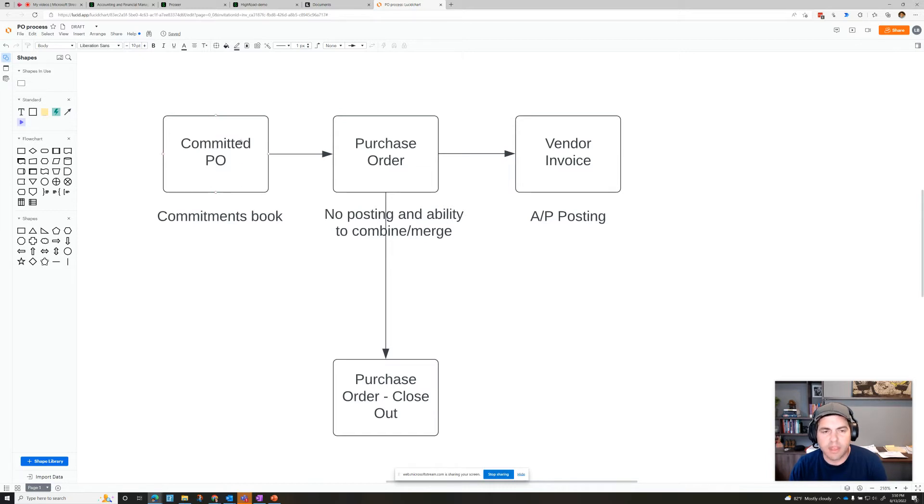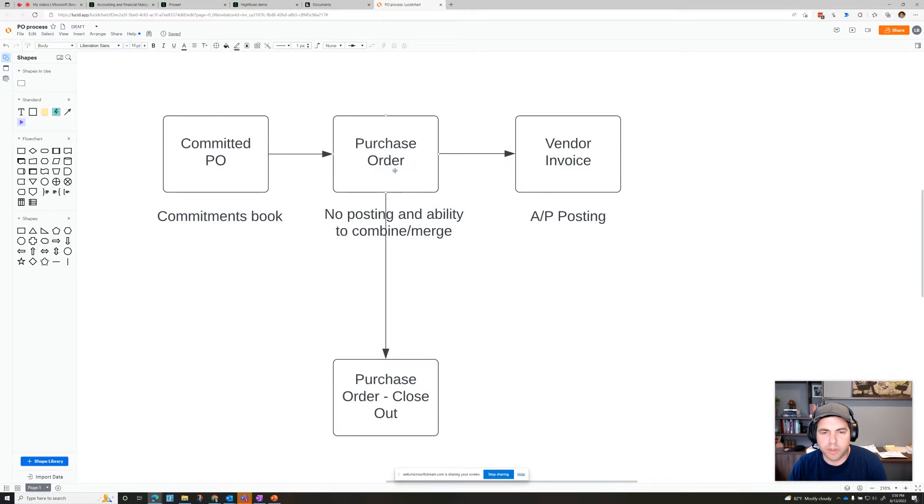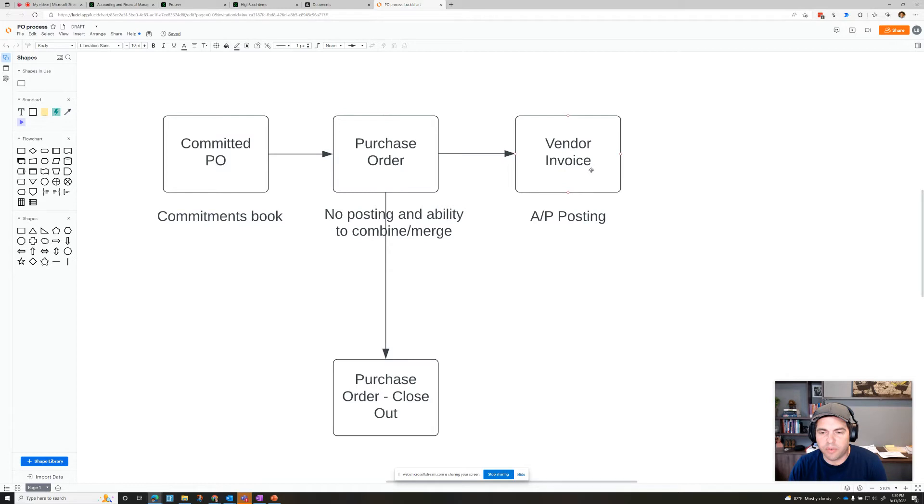Then these committed POs can convert to purchase orders. This is non-posting, but you can merge together multiple committed POs or merge together multiple purchase orders. Then these can convert completely or partially to vendor invoices, and that's when it posts to AP. If we have a purchase order we no longer need, we can also close it out.